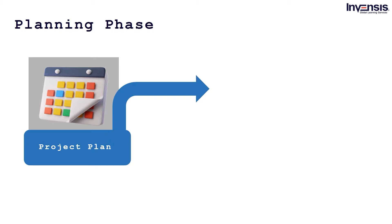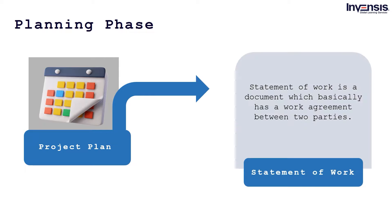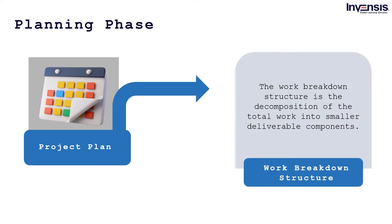A project plan is a set of documents that will guide the entire project. It typically contains various plans including the following. A statement of work is a written work agreement between two parties — it usually contains the scope of work and other information like deliverables. A work breakdown structure breaks down the total work into smaller components or deliverables, organizing the total scope of work and helping in easier project management within the teams.